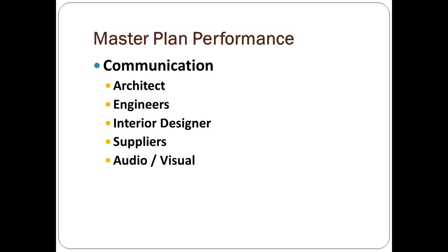Audiovisual. I think I mentioned this in an earlier webinar that historically, in the 70s, 80s, 90s, and 2000s, we have designed it and then gone to the audio-visual lighting guys and said retrofit everything here, and you're asking them to go back and take what you've designed and make it fit for your sound, your lighting, and your power screens and your projectors and anything else that you're doing there.